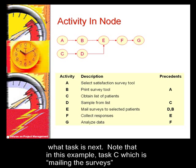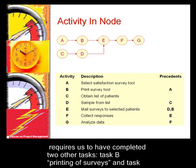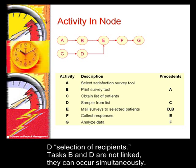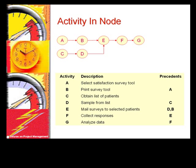Note that in this example, task C, which is mailing the surveys, requires us to have completed two other tasks: task B, printing a survey, and task D, selection of recipients. Task B and D are not linked — they can occur simultaneously.